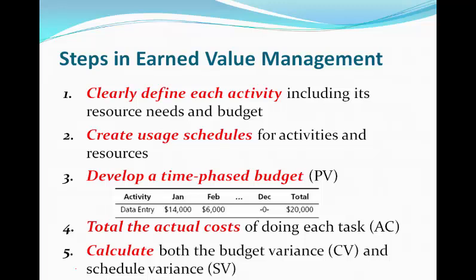So a few steps for using earned value. You need to define the activities, create the schedule, develop a time-phased budget, and do a diligent job of collecting your actual costs for the project, and then calculating your cost variance and schedule variance on an ongoing basis. And we'll see an example here in the next couple of slides.